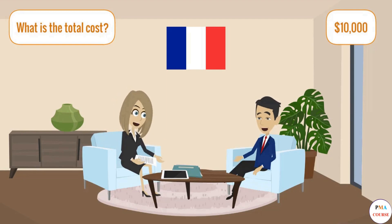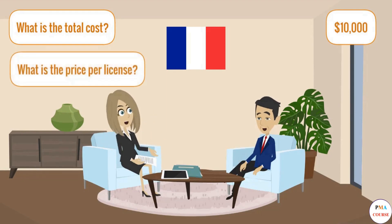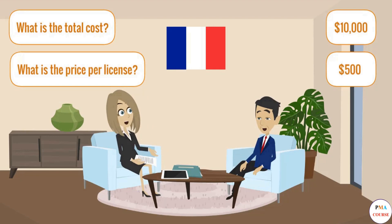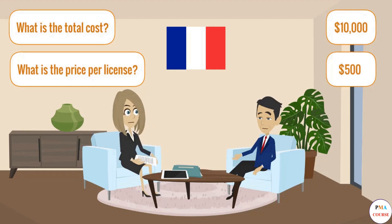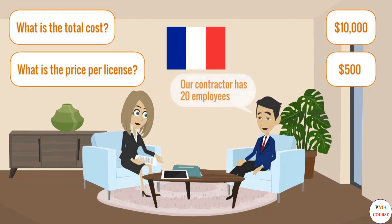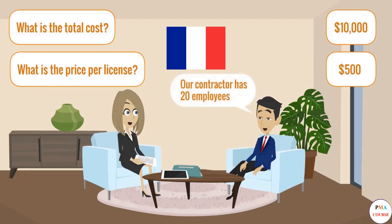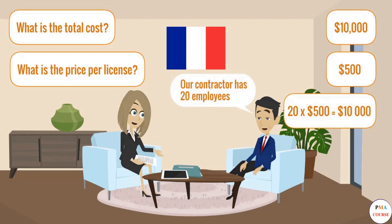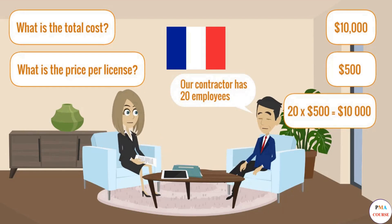'What is the price per license?' Frank answers: 'It's five hundred dollars.' That is the same price as in Japan, so why is the total cost so different? Frank says: 'Well, our contractor has 20 employees — the cost will be 20 times five hundred dollars, which equals ten thousand dollars.'